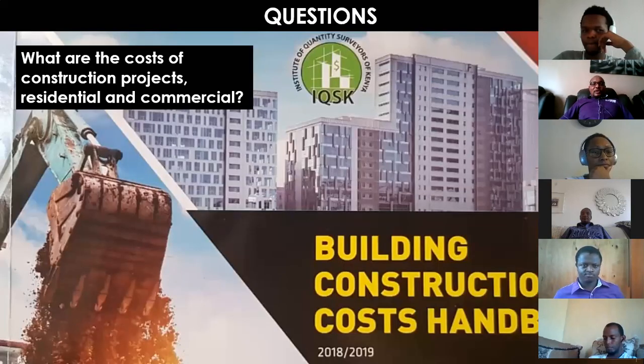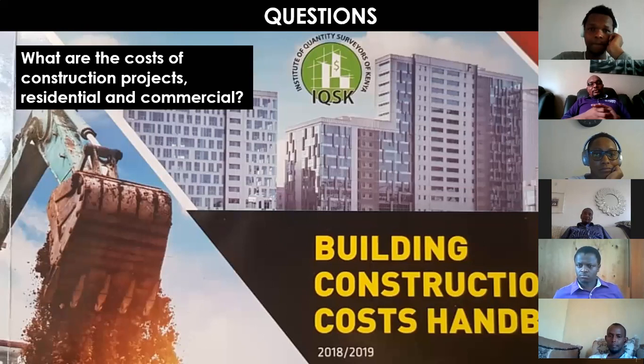And then there's one question about the costs of construction projects. And the person who asked this question asked specifically for residential and commercial projects. So the Institute of Quantity Surveyors usually develops a handbook that we normally use as professionals to guide us as we advise you. And what the handbook looks at is recently constructed projects. For instance, a residential house that has been fully constructed and finished to a specific quality of material and finishes. And we look at the cost of that project.